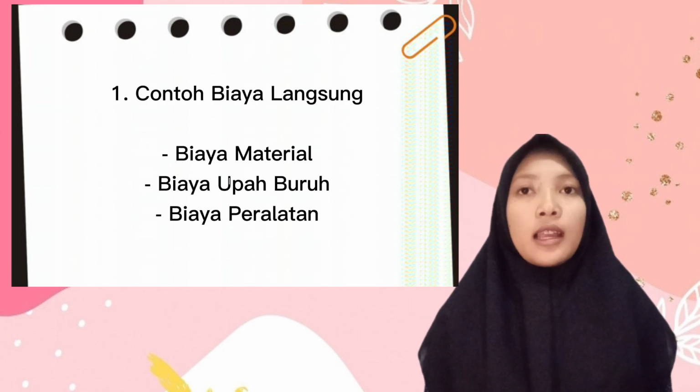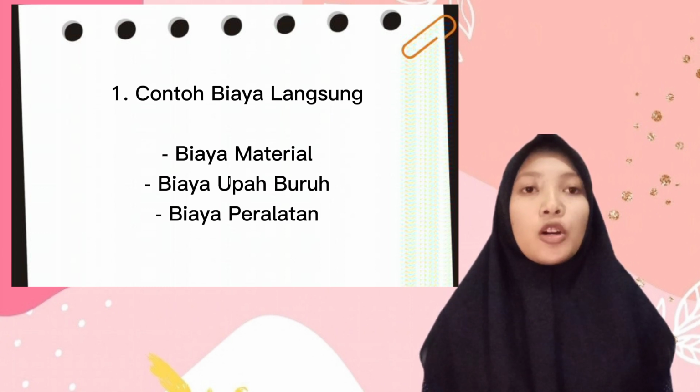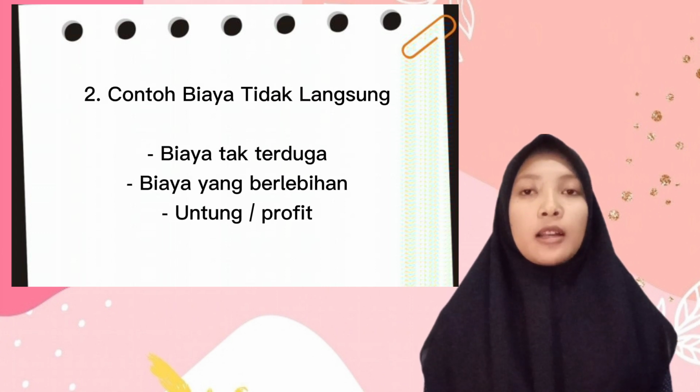Next, examples of direct cost. 1. Material cost. 2. Labor wage cost. 3. Equipment cost. Examples of indirect cost. 1. Unforeseen expenses. 2. Overhead cost. 3. Profit.